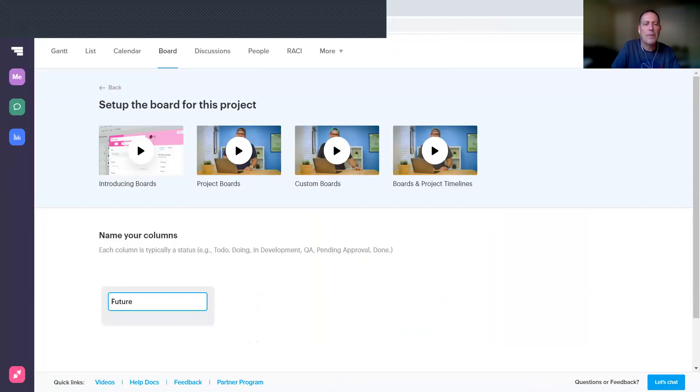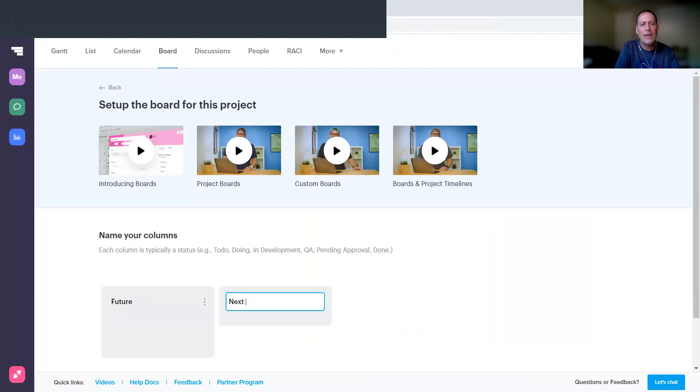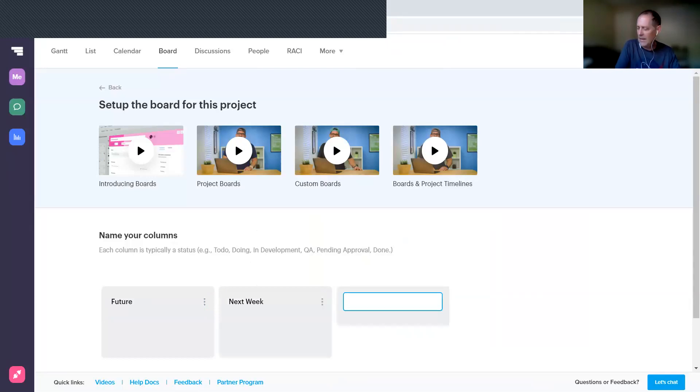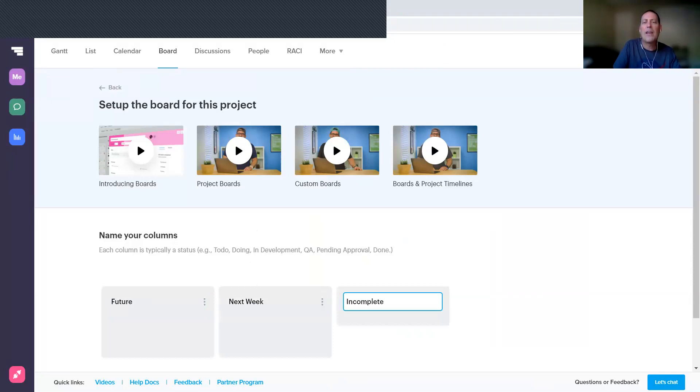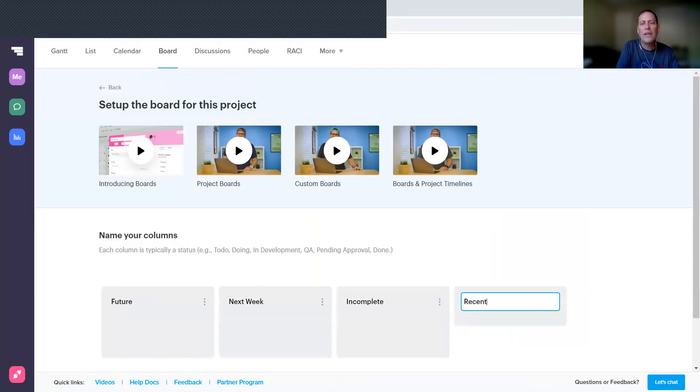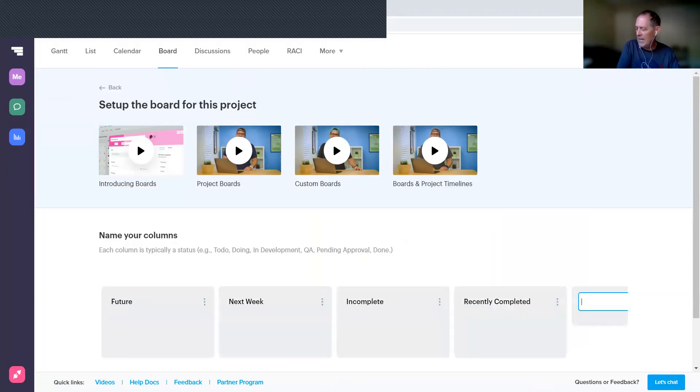I recommend that you create five columns. The first one is going to be Future—those are the tasks that are coming up in the future. Second one is Next Week—these are the tasks that you're going to be working on in the next week. And then there's Incomplete, which will be where you keep the tasks that you did not finish in the prior week.